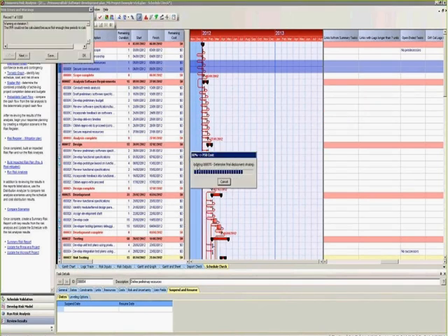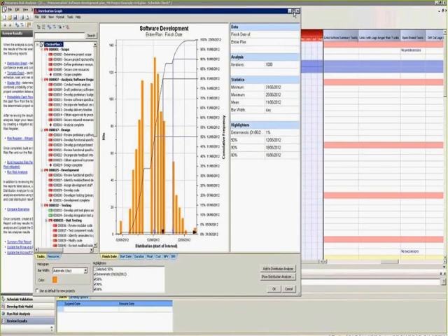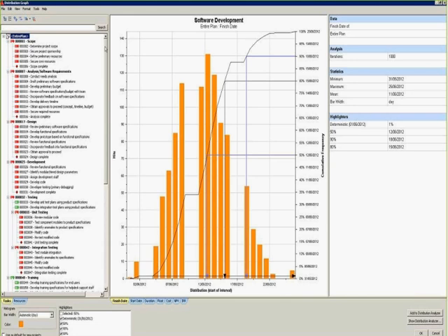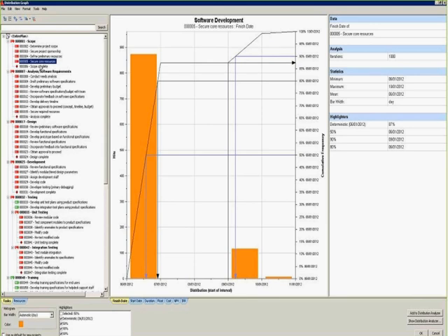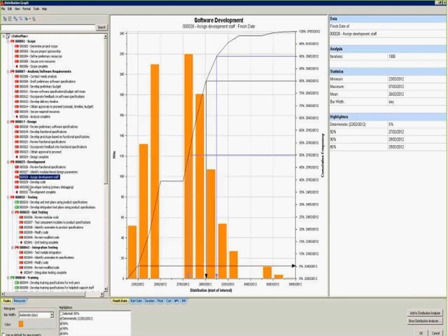Now we're calculating all the percentiles. This is what we call the distribution graph. What's very powerful about PRA is that it calculates this for every task in your schedule, so you don't have to specifically go into it. Tasks which have been simulated and are deemed uncritical are green, and the ones that are not are red. So let's analyze what these graphs mean.